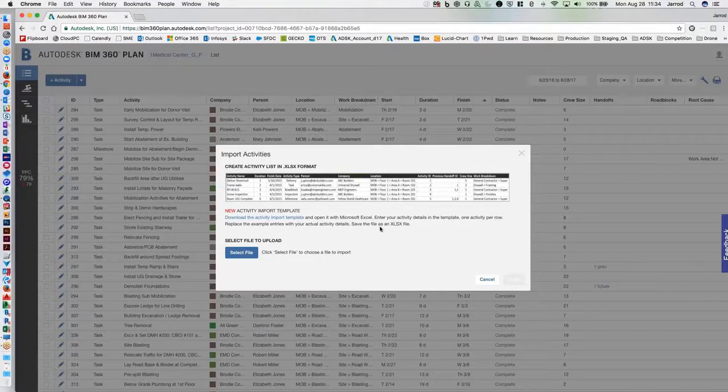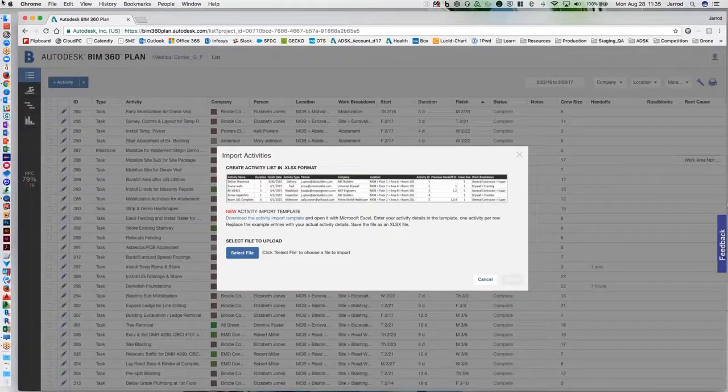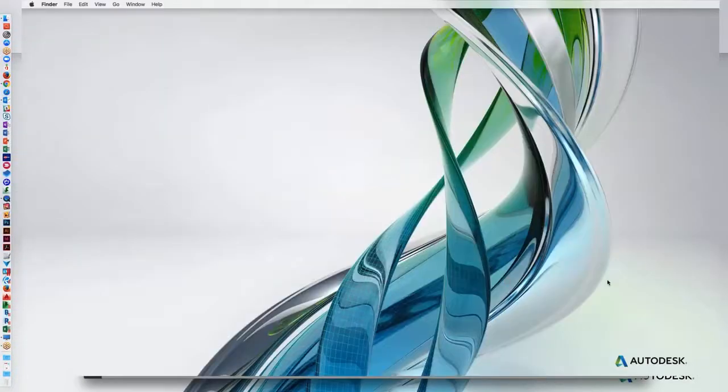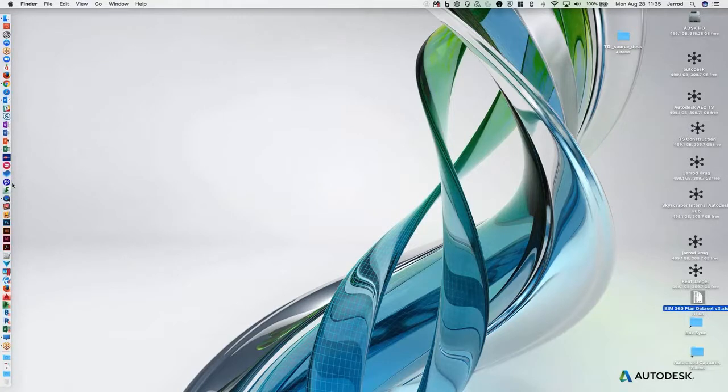So the recommendation here is if you're using P6, SureTrack, or maybe even Microsoft Project, is to grab some meaningful milestone in the future, 9 weeks out, and then get that out of your CPM environment and into the Excel spreadsheet that we've got. And I'll show you, my apologies, let me just flip screens here. I've got that Excel data set right here. We do provide a standard template that you can download.